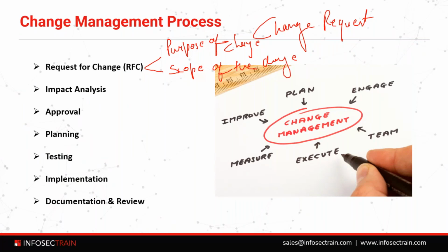The scope of the change, this is the number of devices or users or customers that will be affected by the change. Scope can also include cost and time scales. For a complex project, it might include subtasks and stakeholders. Scope should also include the factors by which the success or failure of the change can be judged, right?